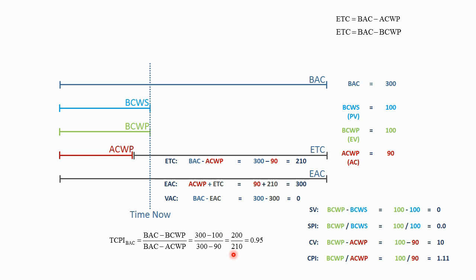So 200 hours of performance divided by 210 hours of budget is 0.95. And what that means is because the project incurred an underrun, is under budget, they could be over budget for the remainder. The cost performance index could be 0.95 for the remainder, and they will still finish within this budget at completion or the estimate at completion.